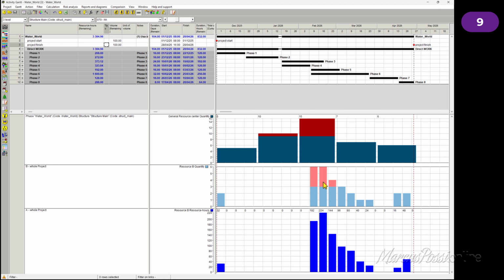So the only condition that your schedule is really not feasible, you can prove, is when you do not have enough labor quantity available, or if you do not have materials to finish your work.